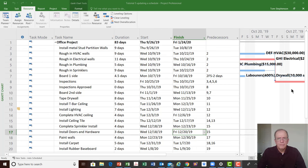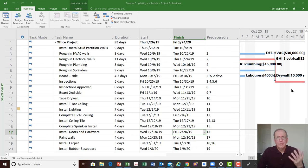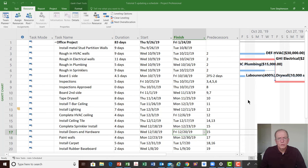In construction projects we typically send out a baseline schedule to the client. Ideally you'd like them to accept it, but people tend to not want to say they accept it — they might say they reviewed it. Regardless, the contractor is going to say if they don't hear back, this is the baseline schedule from a certain date, just to establish this is their plan for the project. Then you can see variances and ask: what caused the variance? Did we cause it? Did the client cause it? Did some outside force like a force majeure event cause the delay? That determines whether you get an extension of time, compensation, or potentially pay liquidated damages.